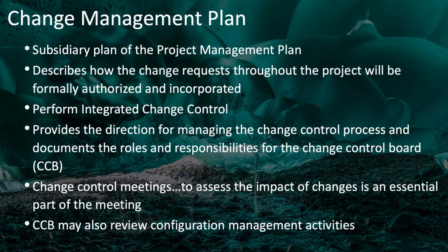Your change management plan is developed during project planning as part of the project management plan and as part of the integration knowledge area. And it describes how all of your project change requests are going to be handled throughout your project, how they will be submitted, reviewed, and formally authorized or rejected, and if approved, how they will be incorporated into your project. The review, analysis, and either approval or rejection of change requests is handled during the Perform Integrated Change Control process, which is part of the Monitoring and Controlling Process Group.